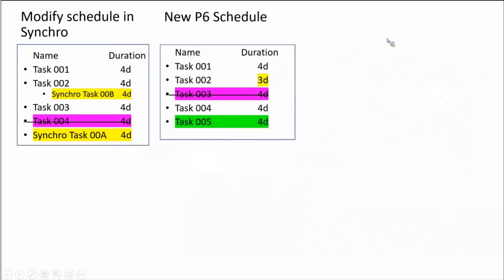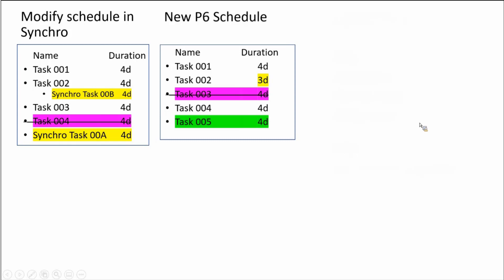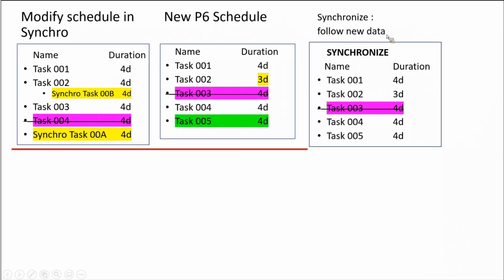We have four options. Skip means do nothing — do not import anything, so our schedule will not change. Synchronize means you will follow the new data exactly. Your data will match your new schedule update. After choosing Synchronize, your Synchro-only tasks will be gone — it just follows the new data. That is Synchronized.